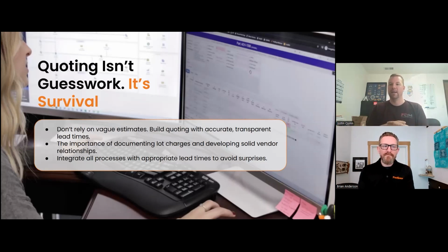But then with outside processing, you need to factor in those shipping days. If it's just right down the road, you might just put in a day for shipping, whether it's your own delivery driver or you might UPS it. But when they receive it, they're not waiting for you to send that part so they can process the order. Right, right. We want to think that's what happens, but there's a day or two of slack there, even if it's 20 minutes up the road. And of course, if you have to ship out of state, UPS is actually pretty accurate on their times.